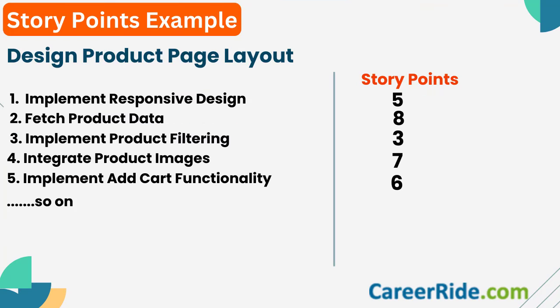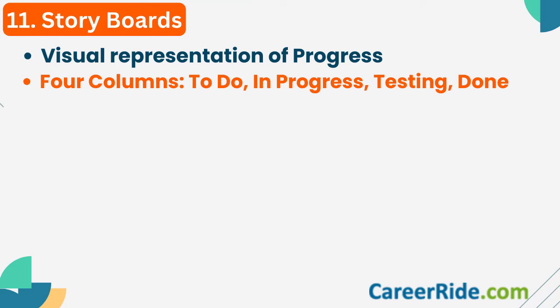For example, suppose your sprint is about building the product page for an e-commerce website. Your story points may cover tasks like implementing responsive design, fetching product data from the database, and implementing product filtering. Based on the effort required, you assign story points — for example, implementing responsive design might be assigned 5 story points. Story boards are a visual representation of a project's progress, shared transparently with the team. A story board generally has four columns: To Do, In Progress, Testing, and Done. Each task assigned in a sprint is listed under one of these categories.